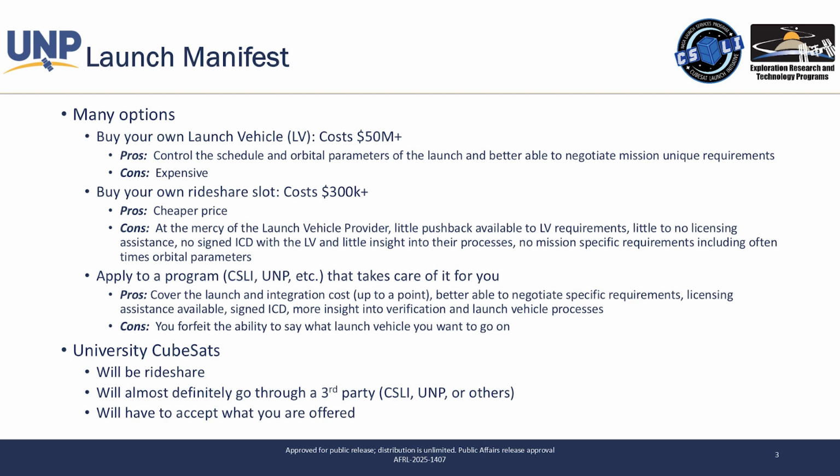And there's actually a payment milestone attached to that, so they won't get paid unless you guys come to a happy medium. And then you also get more insight into verification and launch vehicle processes. The con of this, because our budgets are flat, and we have, to be honest, about 80 CubeSat missions that are currently in the initiative, you forfeit the ability to say what launch vehicle you want to go on.